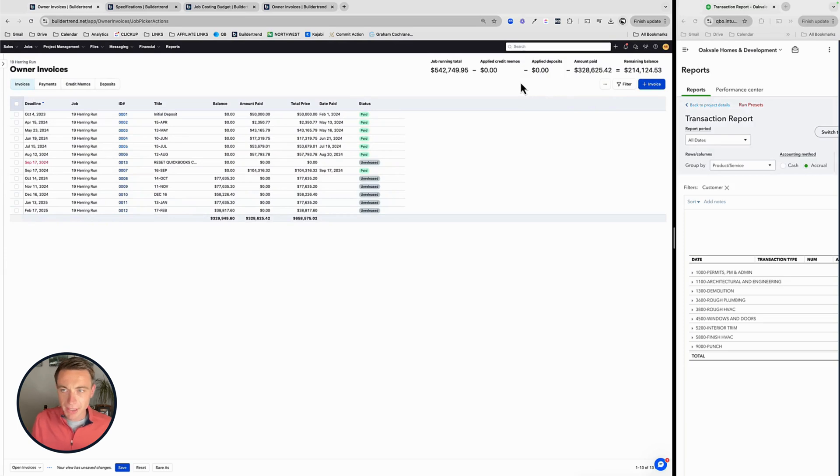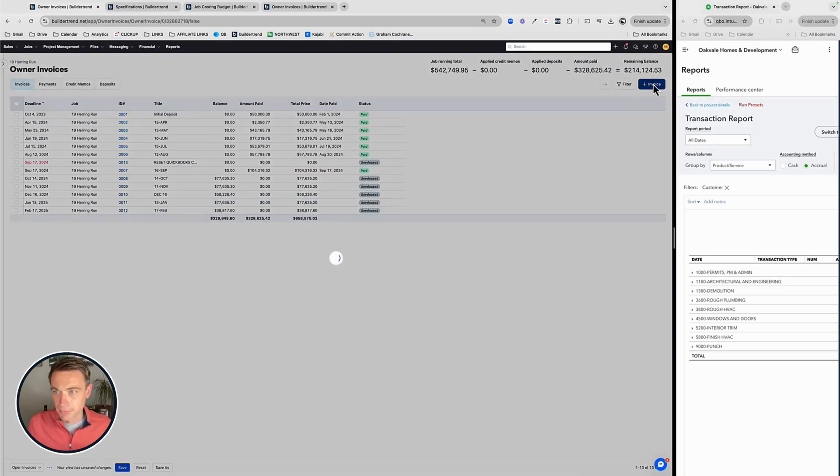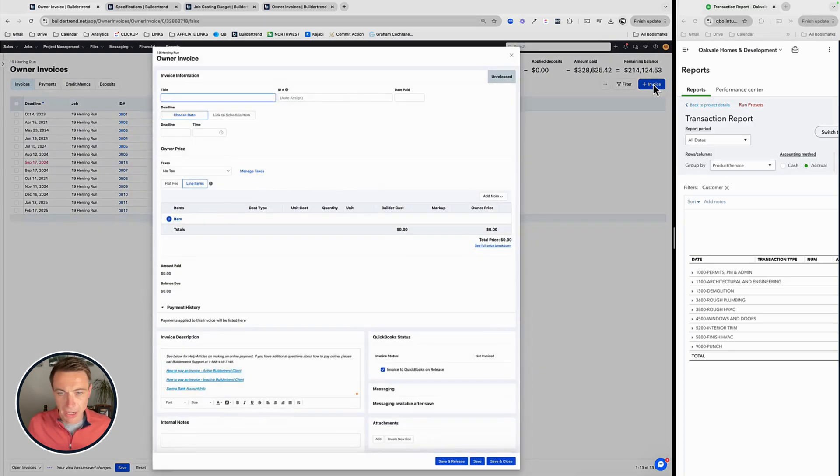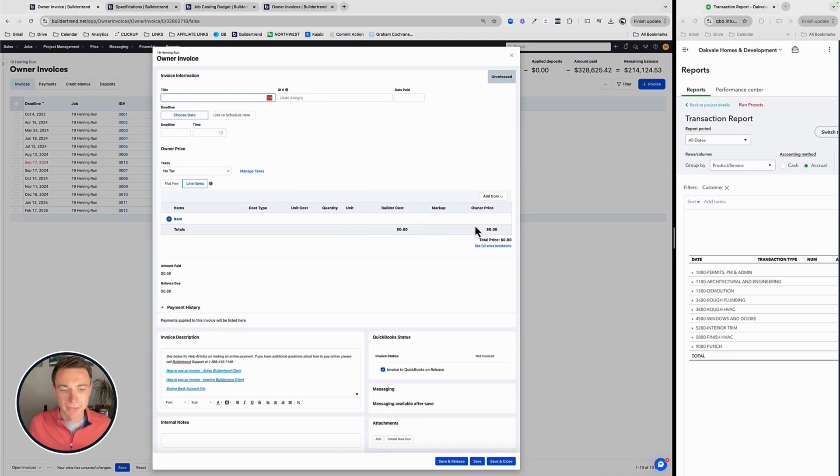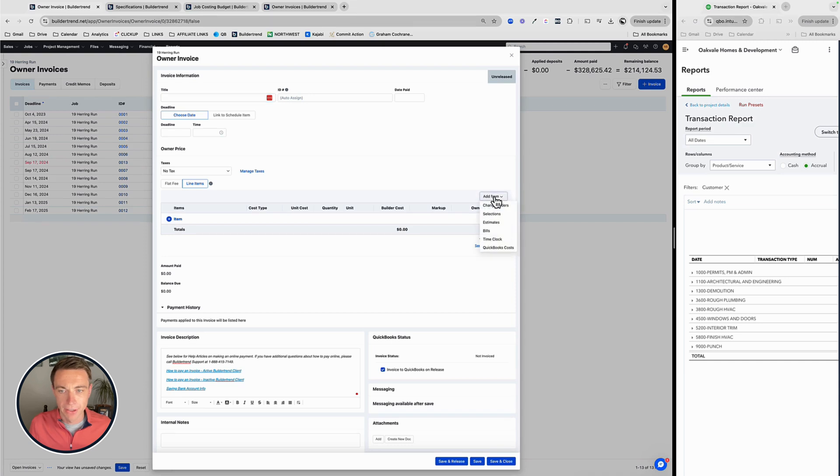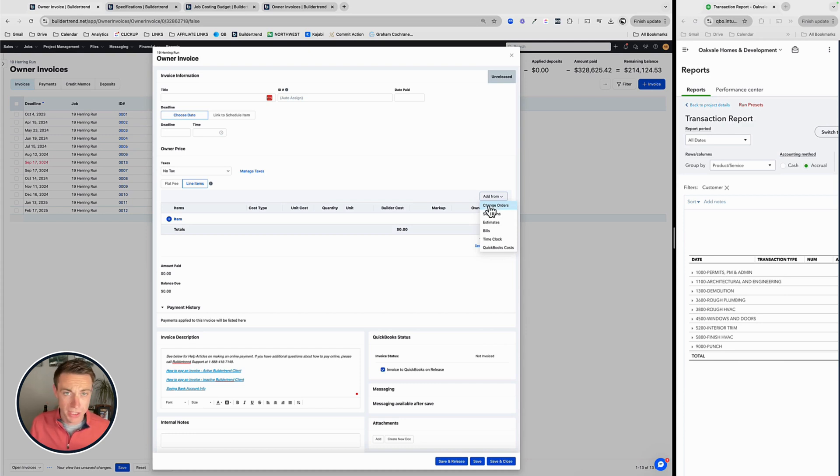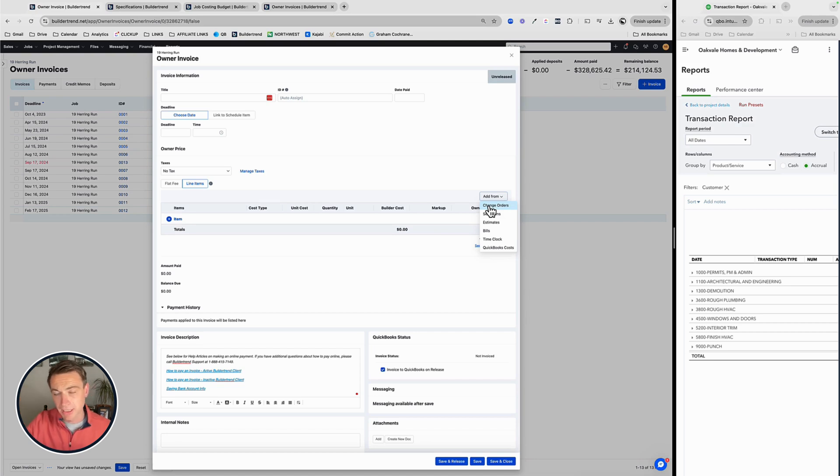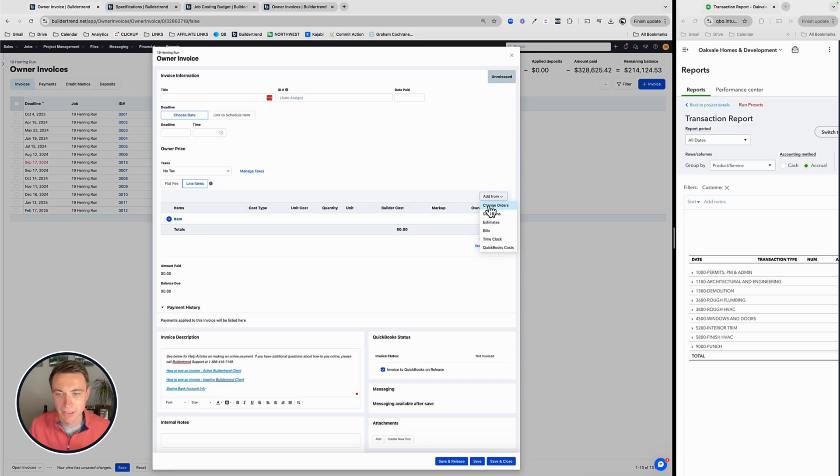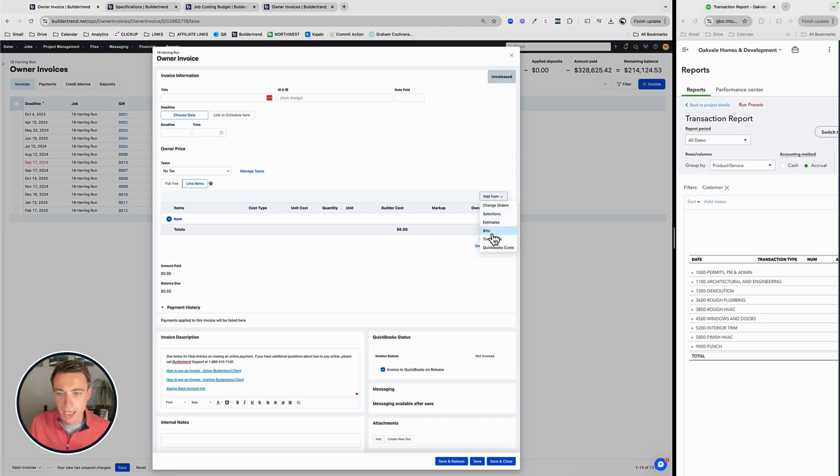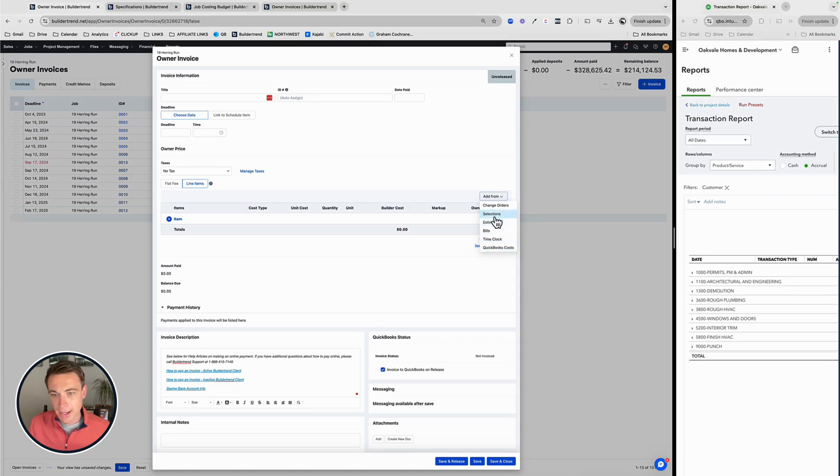So when it comes to this invoicing, basically what's now available when I go to create a new invoice, here's my new invoices right here. I can add from right here. This button I can add from a few different areas. And change orders I do think make sense. If you're doing a, once a change order is approved, you're typically going to take that change order and immediately create an invoice and that's going to automatically take care of that. So that should already be handled. Selections and estimates you can certainly do as well. The bills, time clock, and QuickBooks costs is where I spend most of my time.